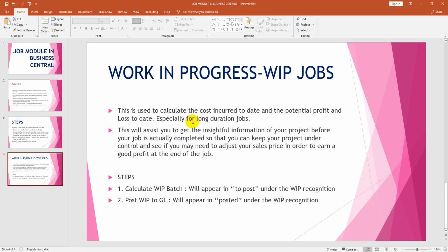I can do a separate video where we do a prepayment invoice on the job task line. This will also assist you to gain insightful information on your project before your job is actually completed, so that you can keep your project under control and see if you need to adjust your sales price, in order to earn a good profit at the end of the job.